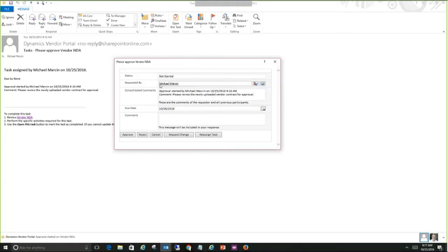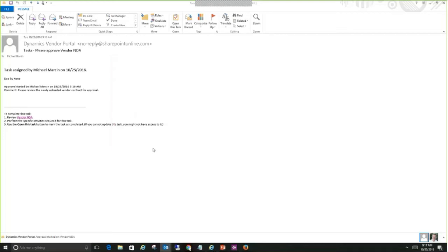So I can see this has been requested by me. I have the ability to comment on this review and say, the new vendor document looks good. Thanks or something. And then I could approve it, reject it, request some changes on it, or reassign it. If I need someone else on my team to maybe take a look at this document because maybe it's outside of my expertise or it's not for my given area, I could go ahead and reassign this task. So we'll go ahead and approve it, and we'll say that that document looks good. Now the vendor will get a notification, of course, that this document has been approved. So they will automatically be updated of its status.